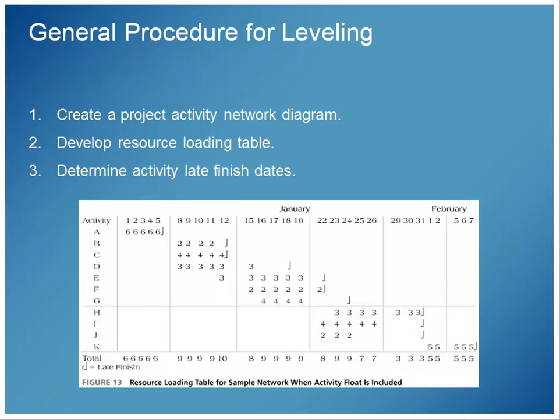If we wanted to be more systematic with this, we would go through each one of our activities. You can see that A has an end date there, and the late finish, or the slack, shows that there isn't one at A. I can see there's 1 day of slack available on B because my end date could be 12. It's 11. There's nothing on C, no slack. D has some slack in there. Again, these are based on the predecessors and what depends on them. E has some slack, none for F. G has some slack, none for H. A lot of slack on I. They did use I this time. I don't know why they didn't last time. J has slack and no slack on K.